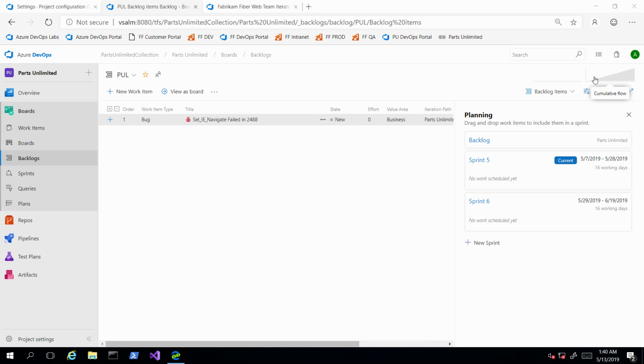But like I said, that's why you scope your team project to include those projects, because now you actually want to manage them on one backlog. You don't want a team with a capacity of 20 have 20 capacity, and then have another project with another 20, so they've actually got 40, but they've only got 20 capacity. So you actually want to manage it across.